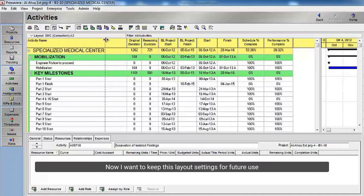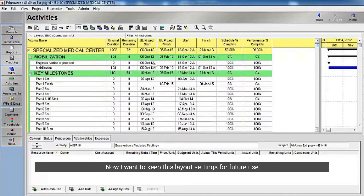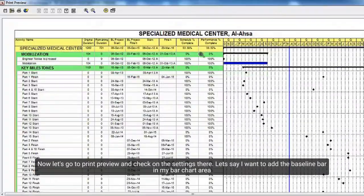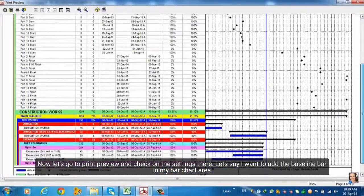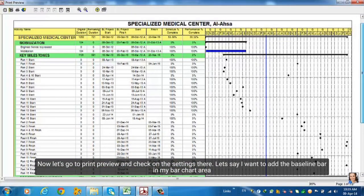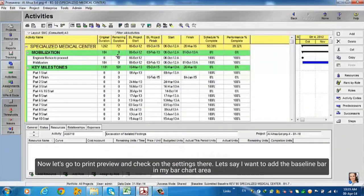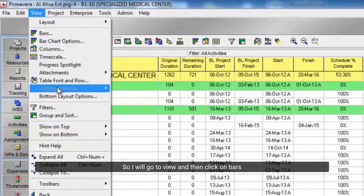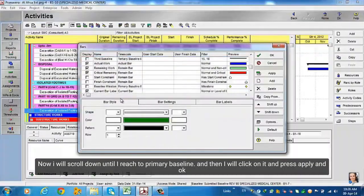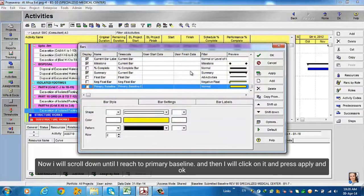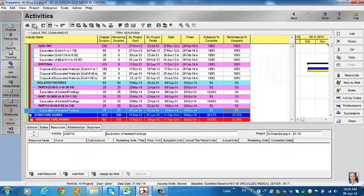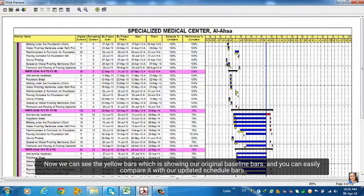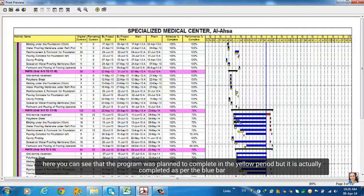Now I want to keep this layout settings for future use. Let's go to print preview and check on the settings there. Let's say I want to add the baseline bar in my bar chart area. So I will go to View and then click on Bars. Now I will scroll down until I reach Primary Baseline, then click on it and press Apply and OK. Now we can see the yellow bars which show our original baseline bars, and you can easily compare them with our updated schedule bars.